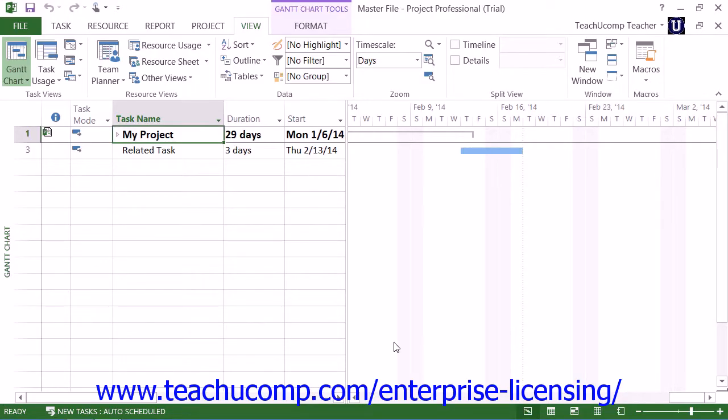Microsoft Project also delivers the ability to create a master project file that contains linked copies of other project files, often called subprojects.